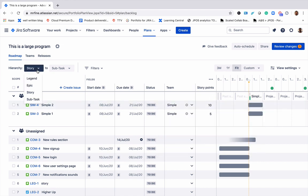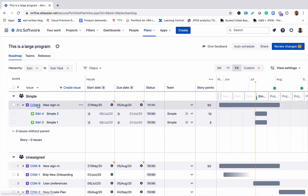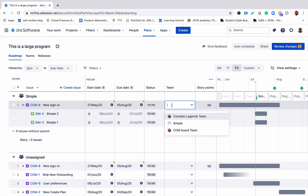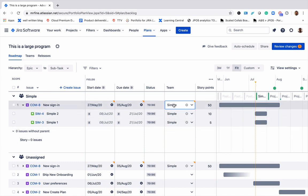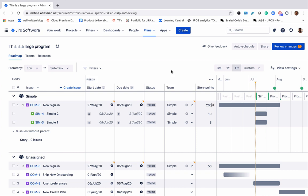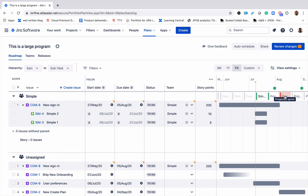We can also expand the hierarchy to include the higher ups. Go ahead and also assign that epic to the team. We can also play with the estimation. So if let's say I think this epic is 200 points, we suddenly see that there's an overflow of work.